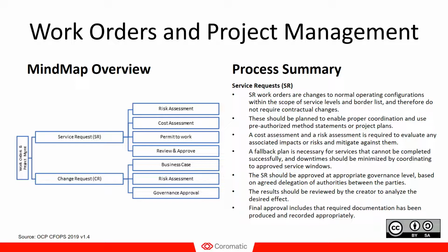And then when the work is supposed to be done, it should be reviewed and approved, or if you like, accepted, that yes, this is what we intended to be done, and it's been done well enough, including the documentation. That is important to remember. It's not enough to do a good technical job unless you also document it, because if you change something to the site configuration, that needs to be documented. Otherwise, we have started the route down a dangerous path of having a mismatch between documentation and the real life situation or the live environment.